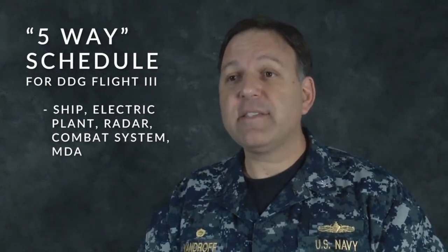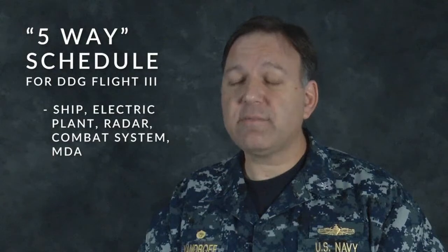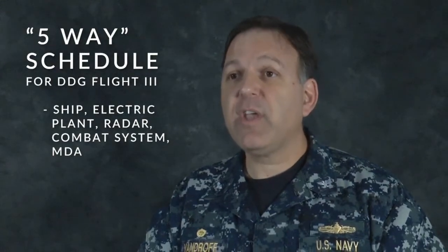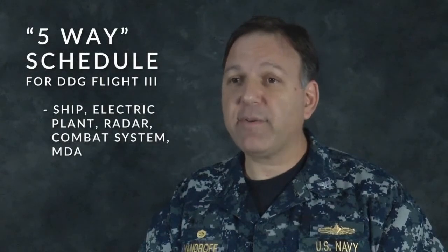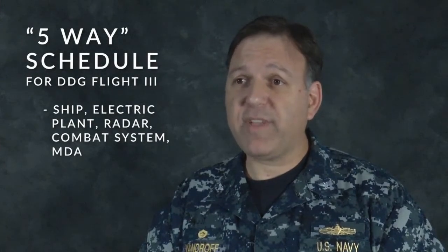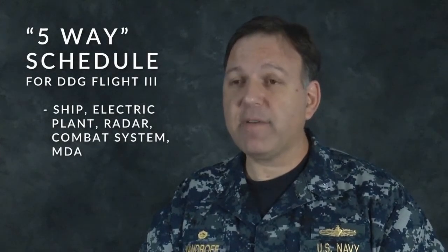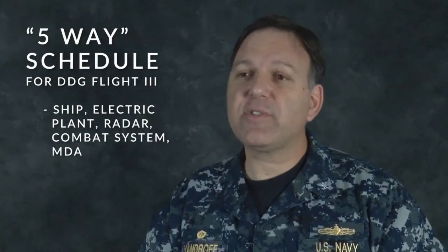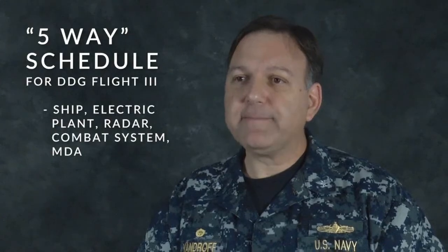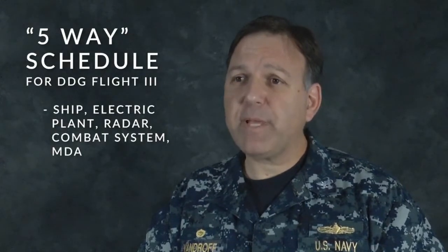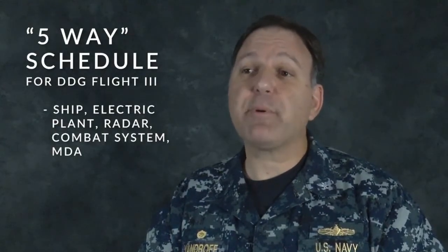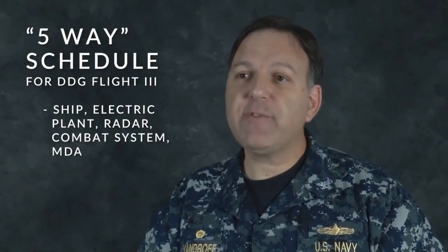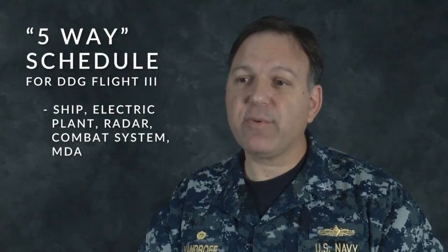Plus, since the radar was designed primarily to enhance the ship's missile defense efforts, you had a separate line of effort for missile defense from the Missile Defense Agency, an agency part of DoD but outside the Navy. And then, in order to service the radar, you had a significant electric plant upgrade, and that had its own separate program manager within the Naval Sea Systems Command. 5 different major program managers all had to keep their schedules synced.